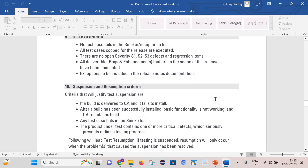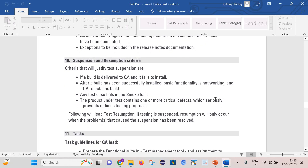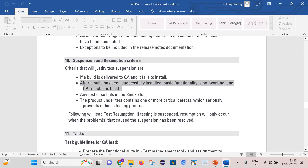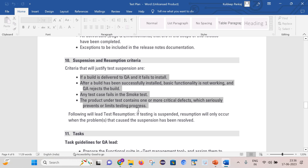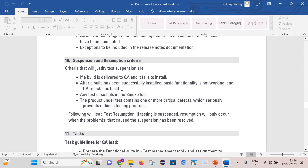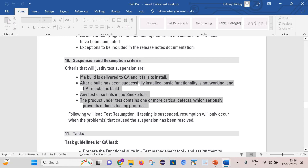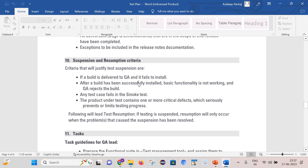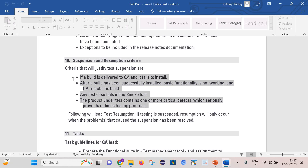Now let's move to suspension and resumption criteria. Testing will be suspended if the build delivered to QA fails to install, if basic functionality is not working after a successful install, if any test fails in the smoke test, or if the product contains one or more critical defects that seriously prevent or limit testing progress. Resumption will only occur when the problems that caused the suspension have been resolved. So if QA receives a build that is not working for any of these reasons, QA has the right to reject the build and accept it only once the blocking issues are resolved.